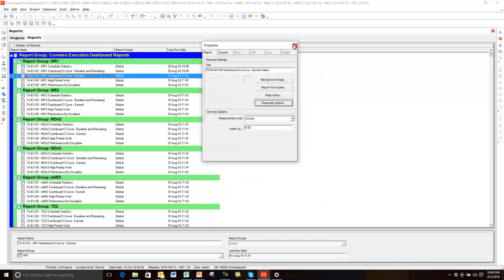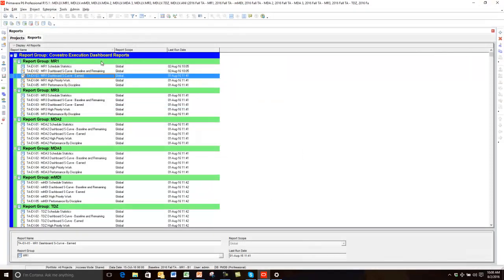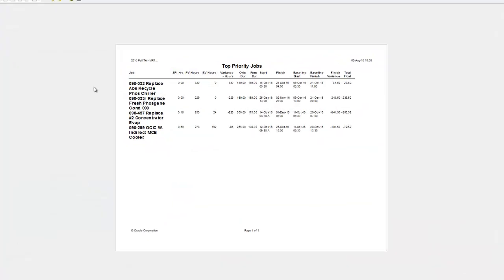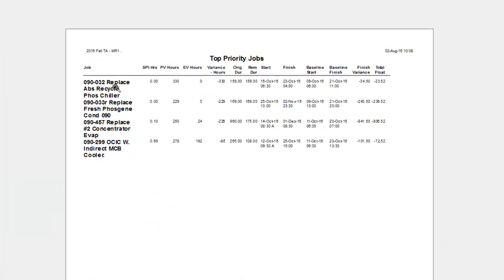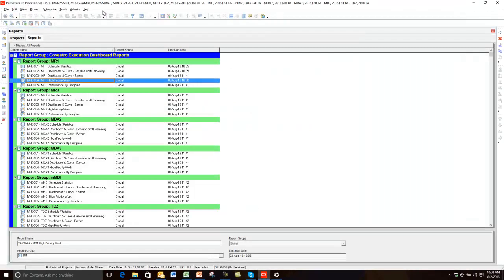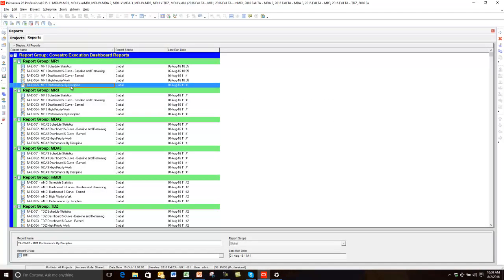I'm going to cancel this and show you the other two. High priority work — we've seen this data already in Excel. It's just a raw data report based on an activity code, grouped by an activity code for high priority jobs. I have SPI, planned earned, the variance of those, then start and finish dates, baseline dates, finish variance, and float. This one was pretty simple to build — I built it as a P6 layout in the activities view first, then hit the add new report button and said use current screen and was able to build this one pretty quickly.